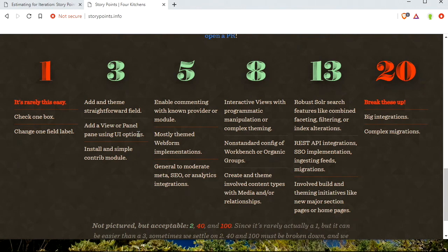So that's at the high level. And then what it really gets down to is if you and I are not sure about something, and you really know this area and it is a 5, and I don't know this area and I really thought it was an 8, I might say, have you thought about that this CMS only runs on a 30-year-old computer? And have you thought about how there are images inline in the content, but they're hot linked from some other service? And you say, yes, I've thought about all these things, and I know it's a 5 because I do work like this. It's like, all right, you win. So the discussion among the team is why the team works together to size stuff. That's part of the process.